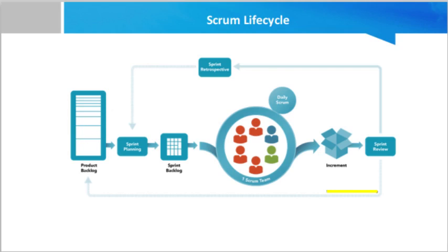Friends, once the product owner makes the product backlog, the sprint planning meeting will be held. Sprint planning meeting is a meeting in which the Scrum team and product owner discuss what requirements they can take up for the next steps. After the sprint planning meeting, the output of a sprint planning meeting is the sprint backlog. Now, what is sprint backlog?